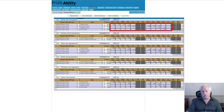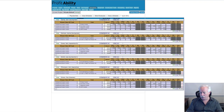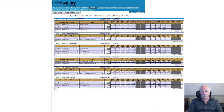Once we write these schedules and click populate data, that assigns the hours to each task under each day. This tells your workers what to work on first, when to work on it, and how many hours they have to complete it. It's not critical that they go in this exact order - for example, if material wasn't there for the primary conduit, they could start on the secondary conduit and enter those hours instead.